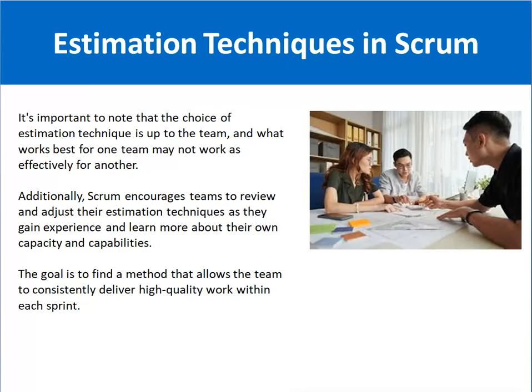Here, friend, notice one thing, that the choice of estimation technique is totally dependent on the development team, because the development team is self-confident, collaborative, and self-organized. So they have to choose which approach is more beneficial to them or more appropriate for the product completion. And also, Scrum encourages the team to review and adjust their estimation technique as they gain experience and learn more about their own capacity and capabilities.